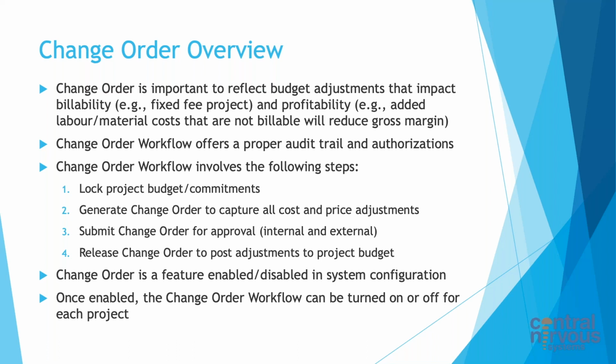So what does that change order workflow look like? First, when we create the change order, we want to lock the project budget and commitments. We create the project from a quote if it's coming through the CRM process, or if you don't have that, then you're just creating the project as a starting point. We want to have those budgets put in and then have those budgets locked.